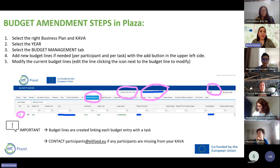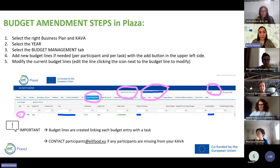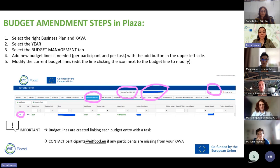For budget amendments, every time you check any tab, please select the business plan year, your KAVA, and the respective year. In the Budget Management tab, you can add new budget lines using the 'Add' button in the upper left, or modify current budget lines by clicking the edit icon next to the budget line. An important note: budget lines are created linking each budget entry with a task, so ensure the task dates are correct and the tasks exist.